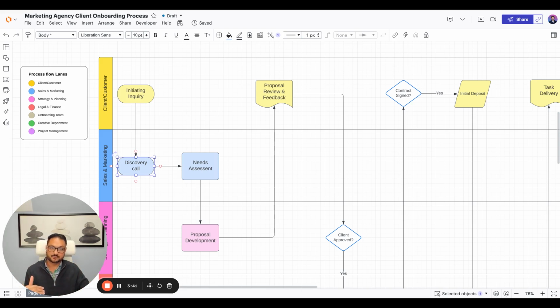And from those tasks, we have also programmed the AI to calculate the number of hours it will take based on the historical data. And from there, we have also tied in the hourly rate it will charge for that task. So for example, the task is a social media post 5 days a week, Monday through Friday. It's going to take 5 hours a week. It will then say, okay, the hourly rate is $100. That's going to be $500. Blog post is going to take 20 hours times 100, whatever that is,